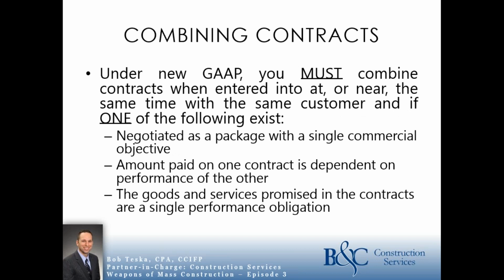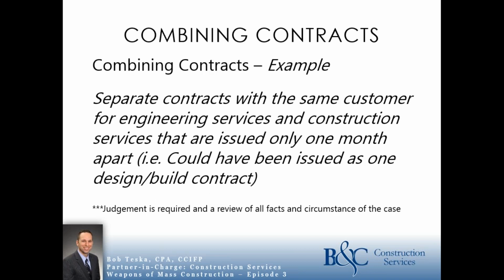Under the new Rev Rec, you must combine contracts when entered into at or near the same time with the same customer, and if one of the following exists. They were negotiated as a package with one single commercial objective. The amount paid on one contract is dependent on the performance of the other, or the goods and services promised in the contract are a single performance obligation. In those instances, you would have to combine the contracts.